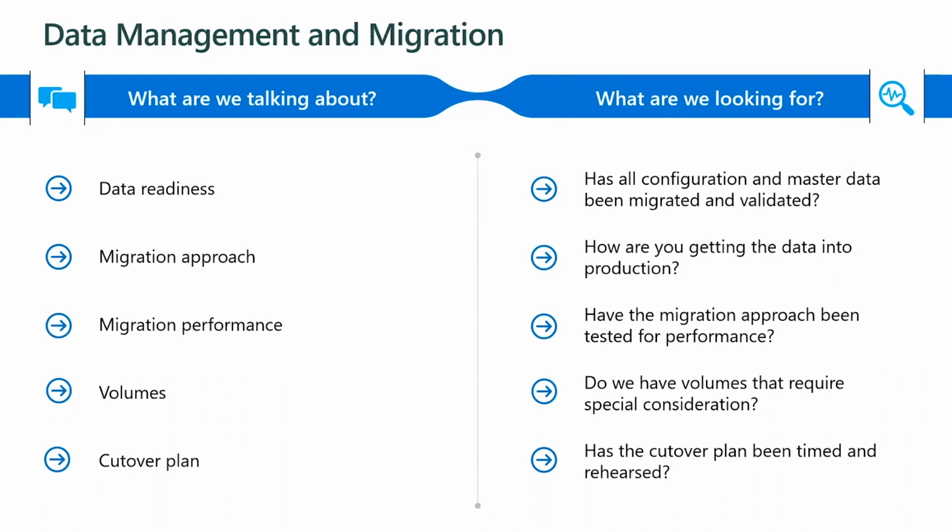If there are any opportunities to automate anything or shorten the cutover by choosing a better strategy, this would be adding to the go live success. It goes without saying that not planning this or testing this before the go live is not a feasible solution. But if the plan is to skip acceptance testing and configure everything manually in production, well, we would normally question such a plan.